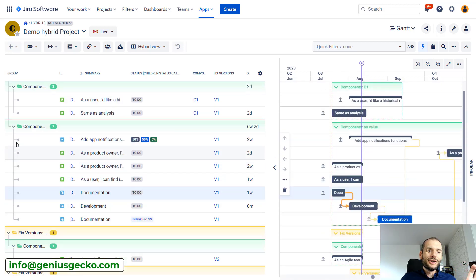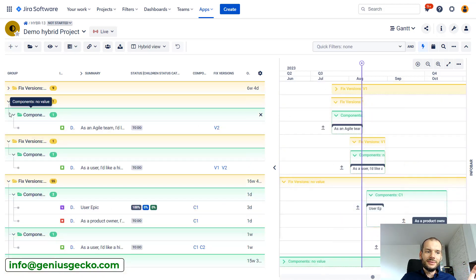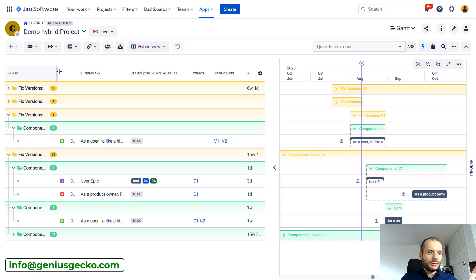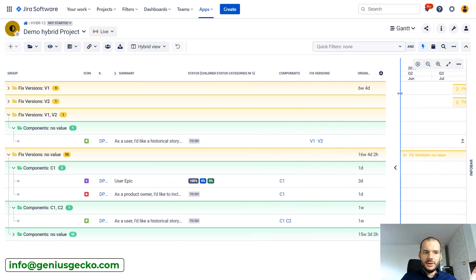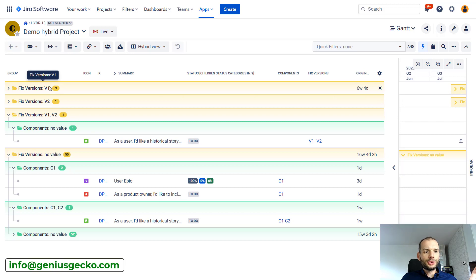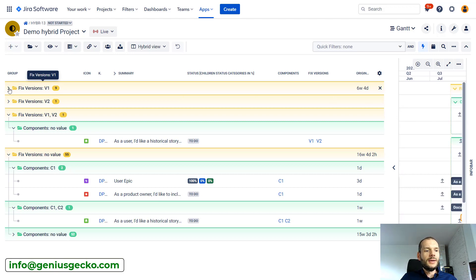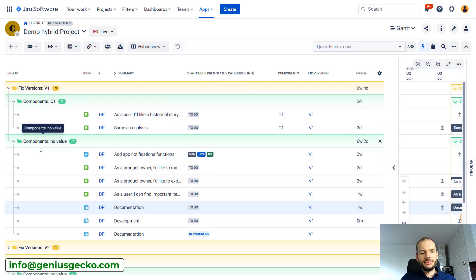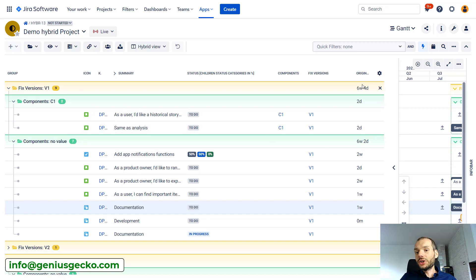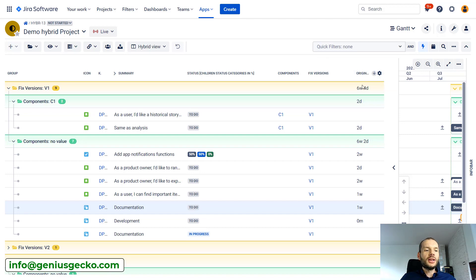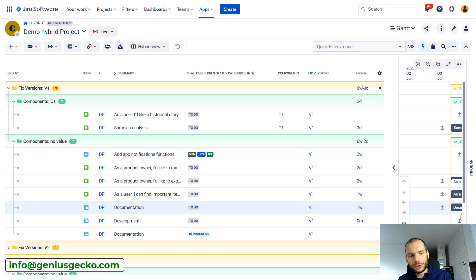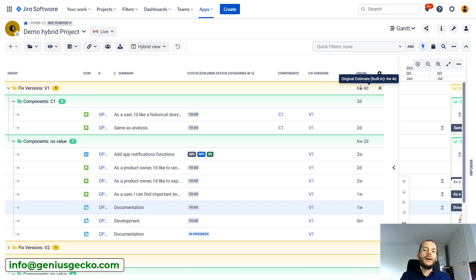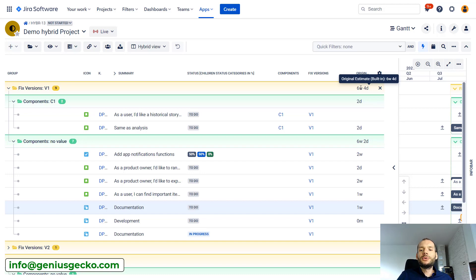our hierarchy seems to have changed. Let's make this a bit larger. You can see that fixed version one, this is the one that is interesting currently for me, contains these issues and below that we have division by components. Here we can see what is the total original estimate for all the issues assigned to fixed version one. So now we are not looking for the sum from the perspective of work breakdown structure hierarchy, but from the perspective of fields, or issues with the values in the fields that we just grouped.